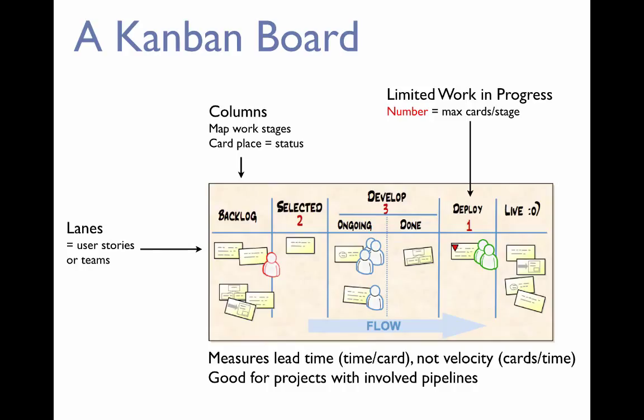Another way of organizing the information, and there's lots of internet information about that if you want to read up on that, is a so-called Kanban board, which is also something you can use to organize all your work if you'd rather do that. Kanban board is something else that came out of Japanese project management, and the main thing that it does is for the different statuses that something can have. So it's chosen to be worked on, selected, it's ongoing, it's done, it's deployed, it's live, etc. The main thing is that the Kanban board doesn't have a limit of how much stuff you commit to within an iteration,